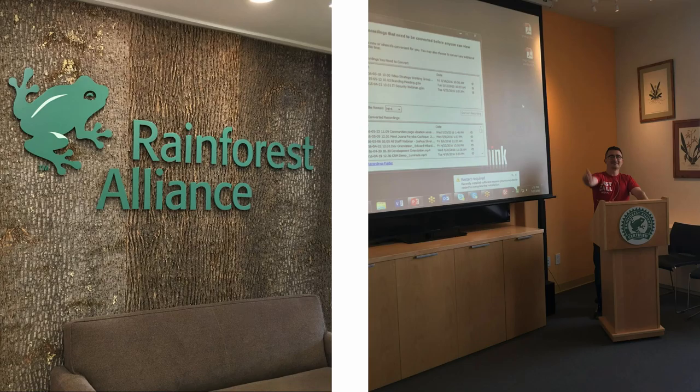Once we were all feeling pretty good that this backlog is a pretty good list of all the things that we would like to get developed, fleshed out and developed, we went on site for a 2-day collaborative guesstimating, because it was very important to them, since we knew that it was a 6-sprint budget. Is it crazy to think, right, that we can do this work within 6 sprints? We needed to have a sense of, will it all fit?